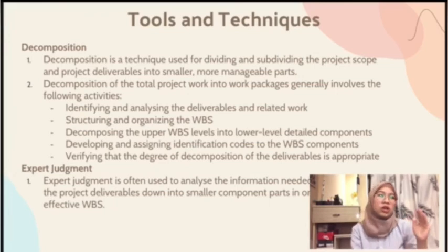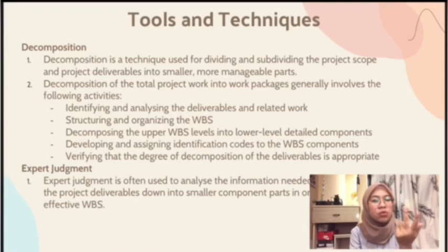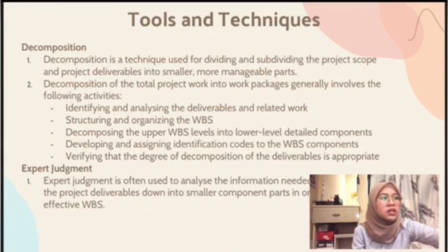The WBS structure can be represented in a number of forms such as using phases of the project life cycle as the second level of decomposition with the product and project deliverables, using major deliverables as the second level of decomposition, and incorporating subcomponents which may be developed by organizations outside the project team, such as contracted work. The seller then develops the supporting contract WBS as a part of the contracted work.